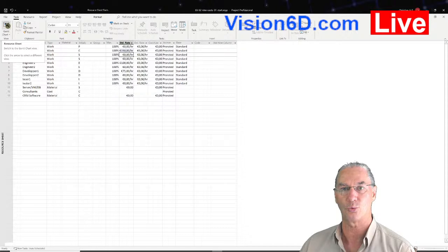So from 54 it jumped to 96, and you see that this is just due to the fact that the Chief Marketing Officer is involved for quite a lot of hours into our project, and you see that it is mainly in the beginning when they define the scope. And this is important to understand when you are in a project. You are dealing with a lot of stakeholders.